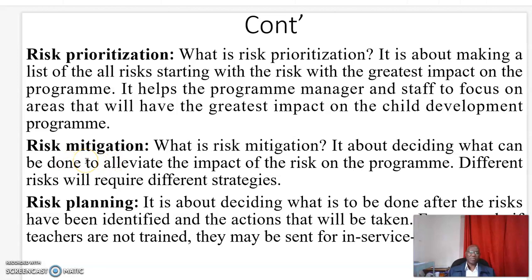Risk mitigation. After you have actually identified your risks, it is time now to mitigate. And risk mitigation is about deciding what can be done to alleviate the impact of the risks on the program. Different risks will require different strategies. And finally, risk planning, which is about deciding what is to be done after the risks have been identified and the actions that will be taken. For example, if teachers are not trained, they may be sent for in-service training.